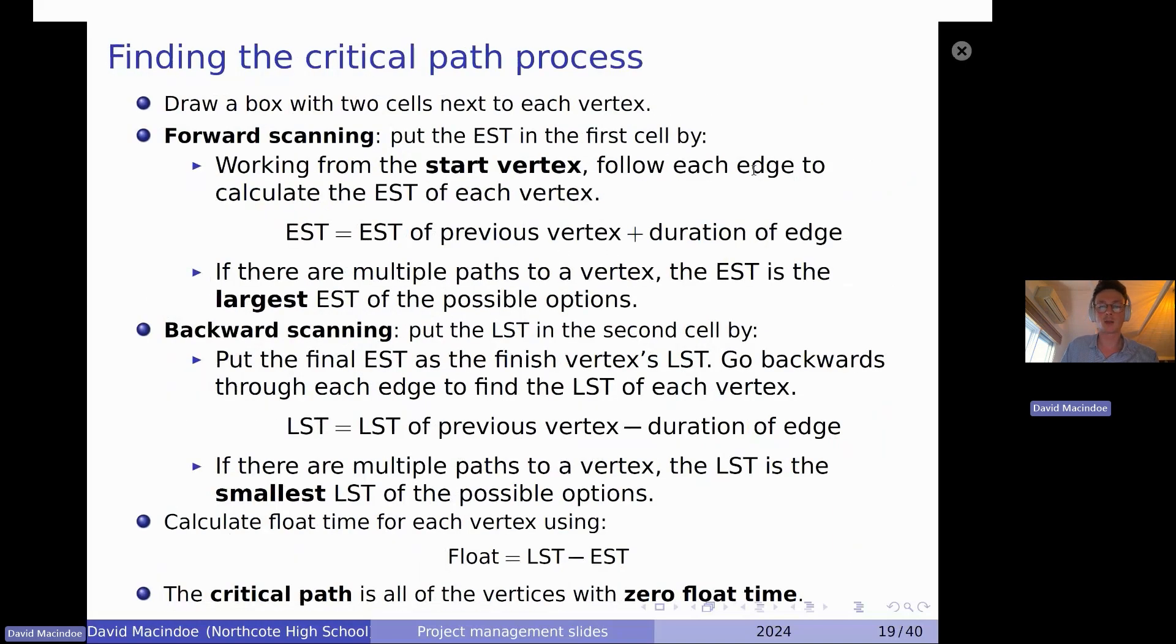So here is my notes on finding the critical path. I would suggest probably having something like this in your bound reference could be good. What I do is I'm going to draw a box with two cells, so just kind of two boxes next to each other, next to each vertex, normally just kind of just above it.